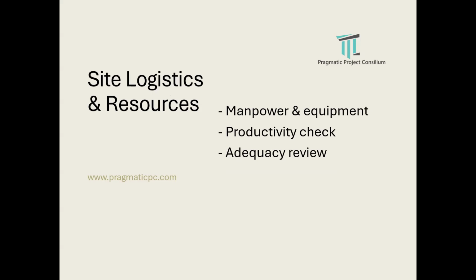Site logistics and resources, what is the manpower histogram, whether it is as per the agreed contract, what is the productivity of the site, whether there is any decrease in productivity or increase in productivity. So all these things the site resources will cover.